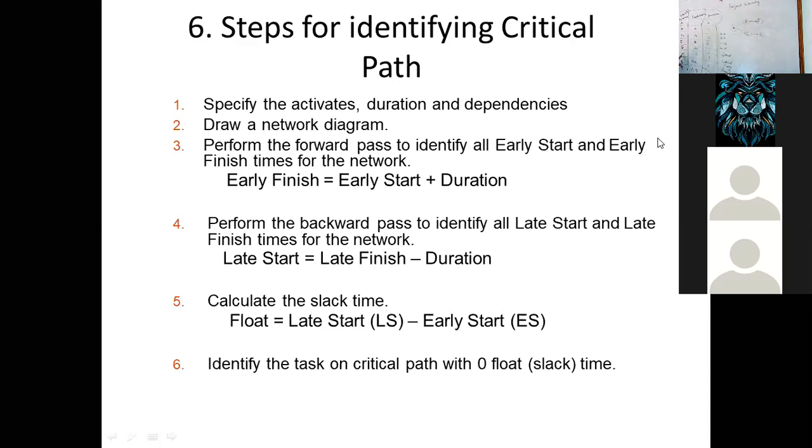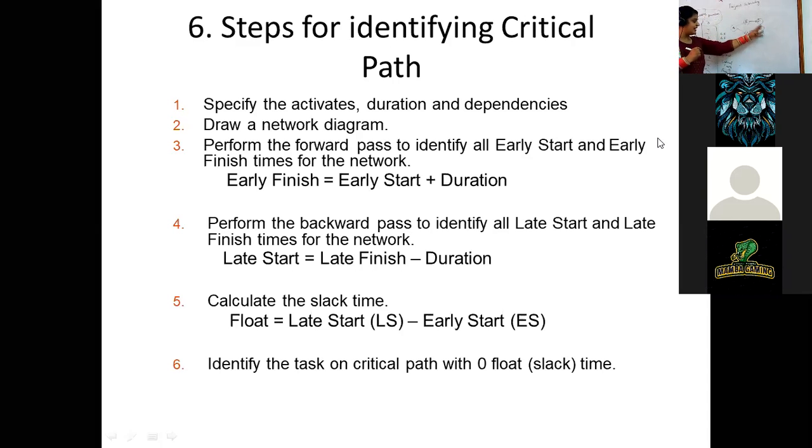You can see. Now the F activity. F activity is also dependent on C. So that means there is another activity called F, and that is also dependent on C. So F and E are parallel, and they have a predecessor C here. After that, there is an activity called G that is dependent on D and E.